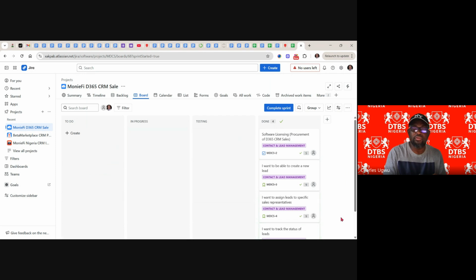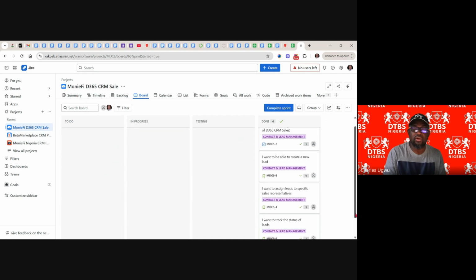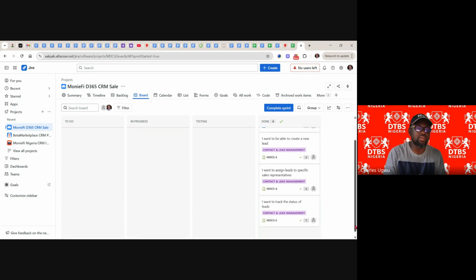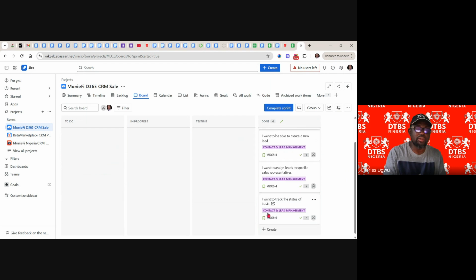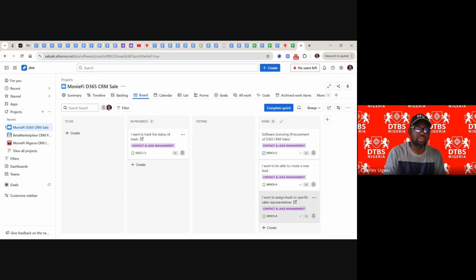When you are finishing and you find out you couldn't finish a work item, like for instance this one, when the time is up, it's not a must that you finish. When the time is up and you didn't finish, you take it back to the product backlog and it forms part of the next work.